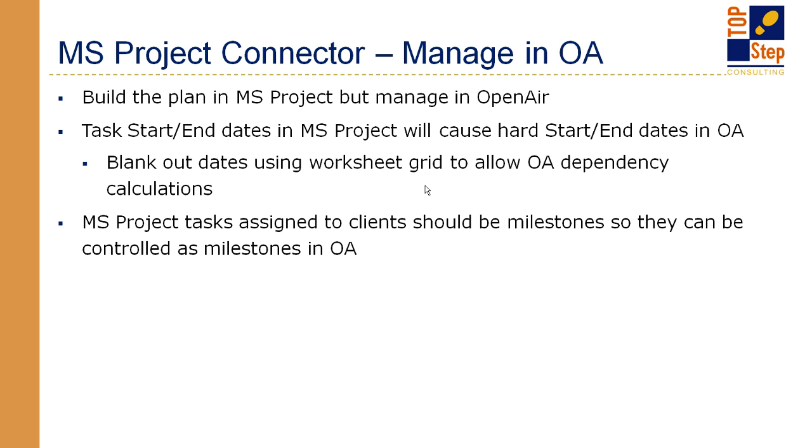For tasks that are assigned to clients, you want to create them as milestones in Microsoft Project so they can be managed as milestones in OpenAir. Just a tip. It's much easier from a management standpoint that way.